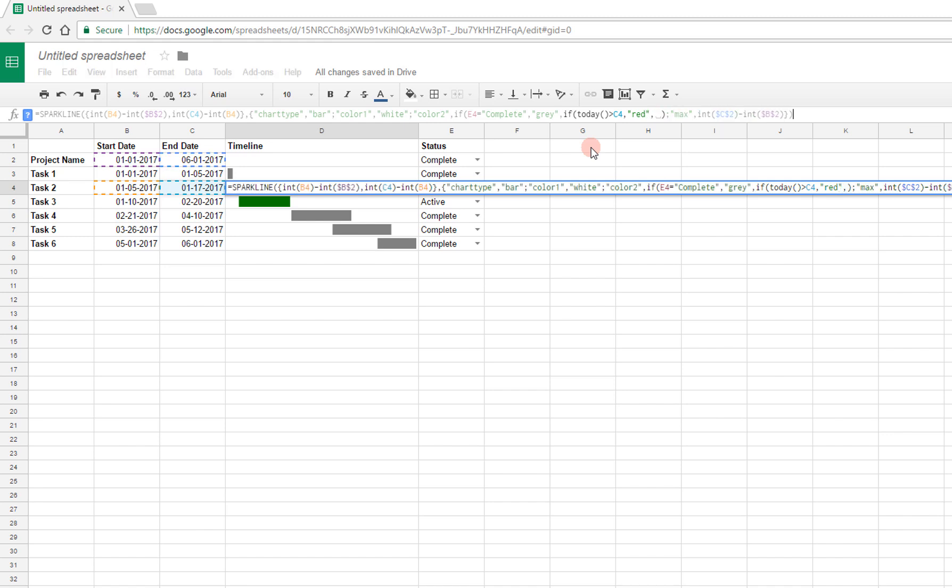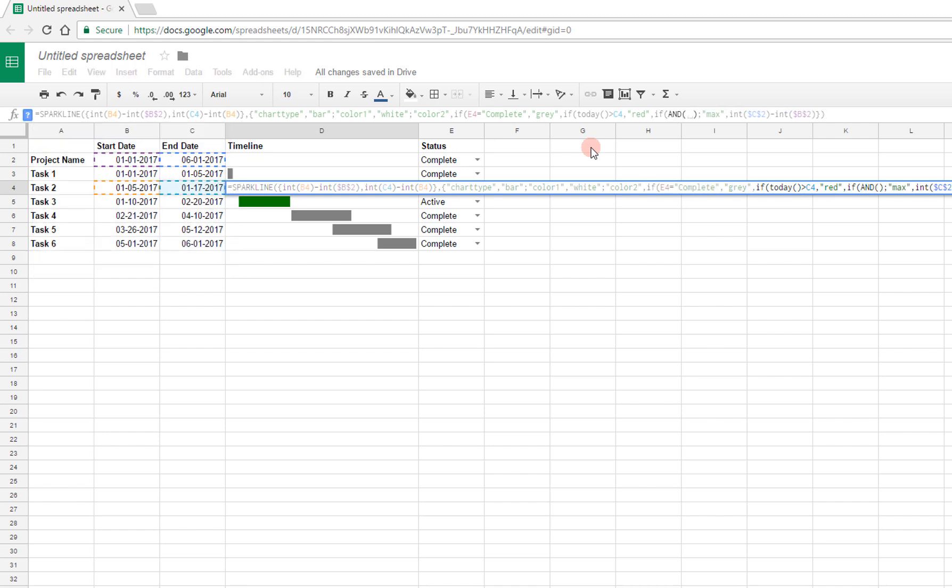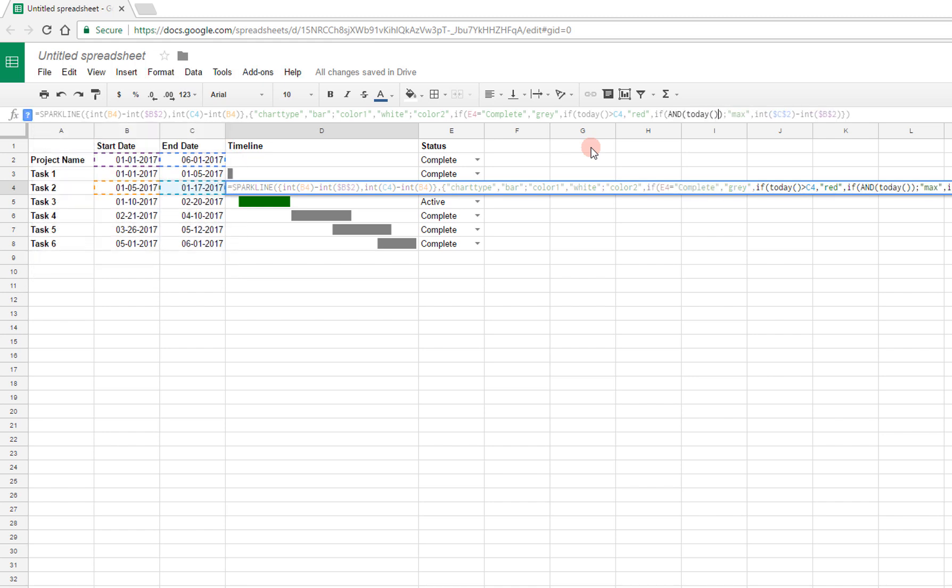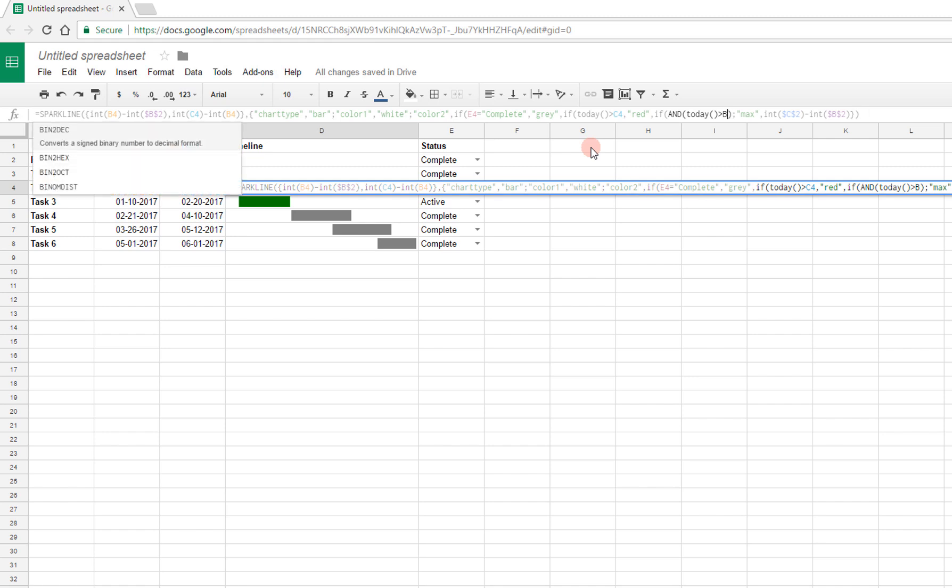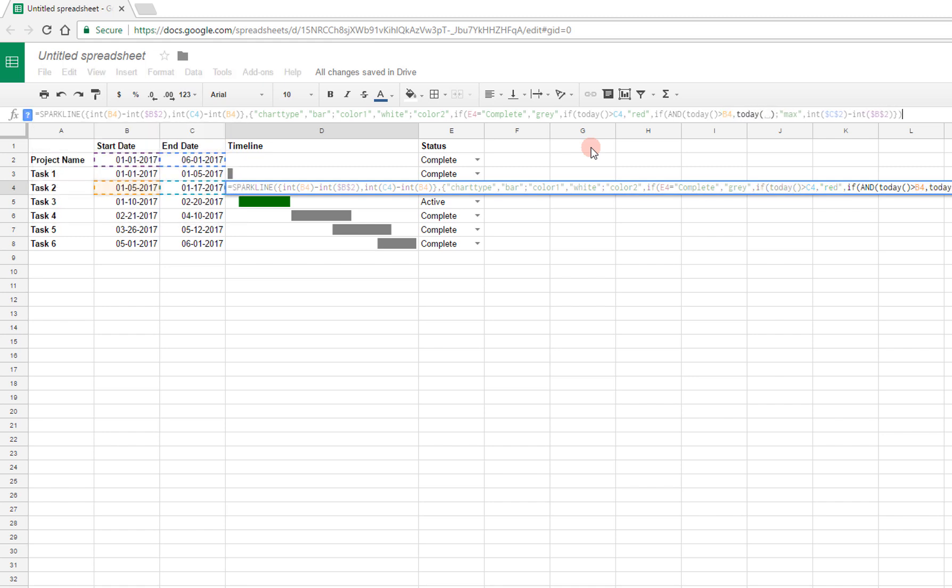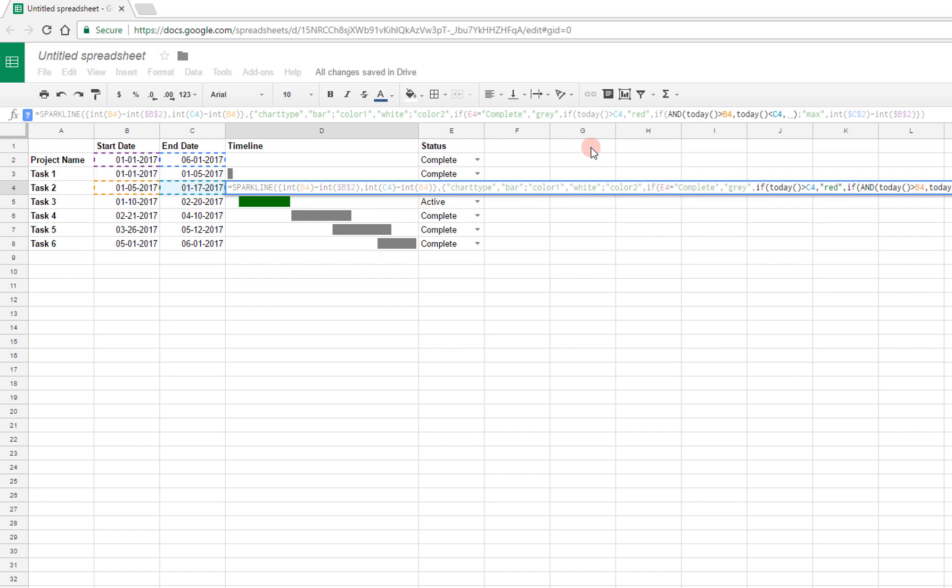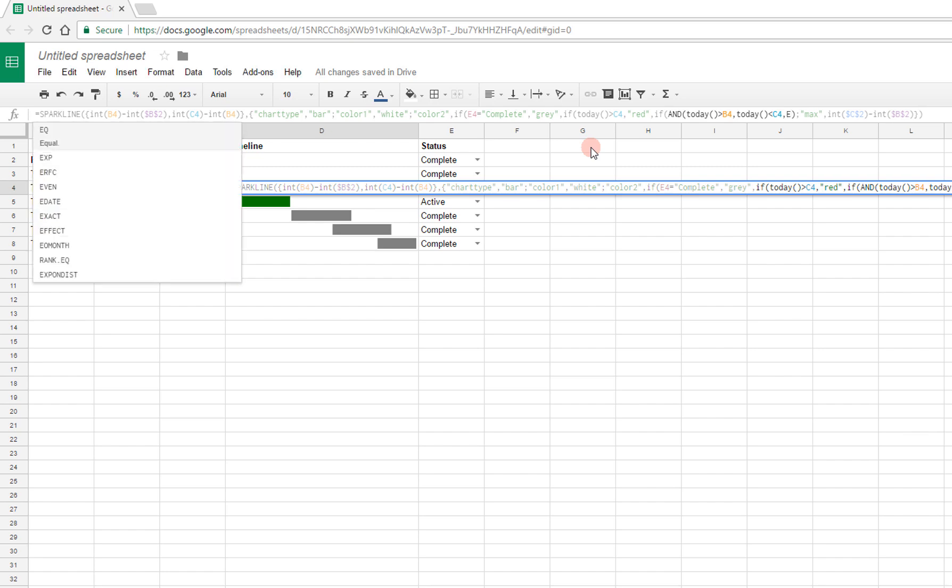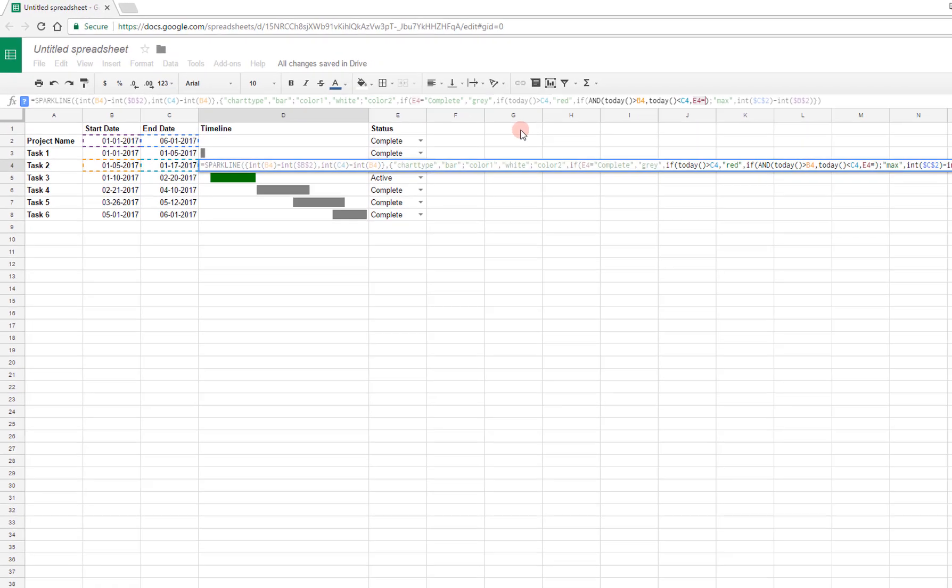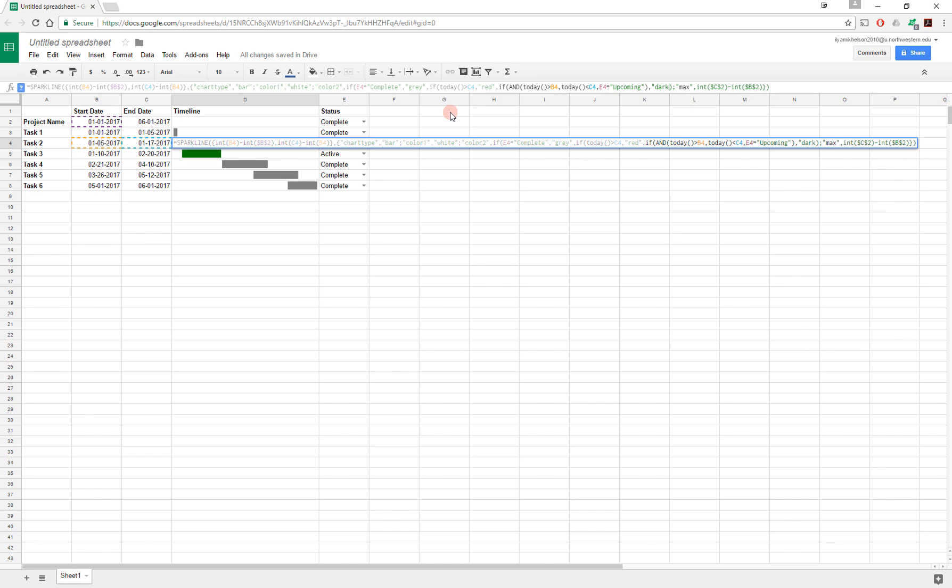And otherwise, if, and I'm going to use an and statement to combine two conditions, if today is greater than B4, and today is less than C4, so if we're currently inside of the project window, and E4 is still upcoming, which is not good, it should already be active, then I'm going to mark this as dark red.